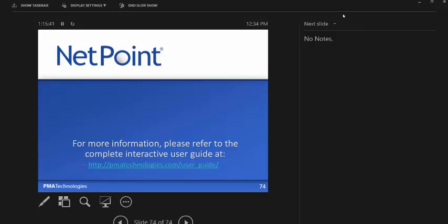Is there any thought to the added time as far as what you're going to do to just get to the job? So anybody else feel free to chip in, but the subjective duration question, I think, relates to, do you have a method by which you are calculating your duration? So if you have a process in place that helps you to determine how long something's going to take inside the reactor versus outside the reactor, then that's no longer subjective. Subjective is, I think 2 weeks. That's subjective. You guys agree with that?